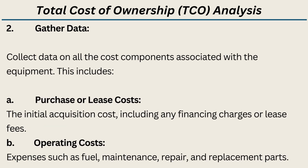Step 2: Gather data. Collect data on all the cost components associated with the equipment. This includes: A. Purchase or lease costs — the initial acquisition cost, including any financing charges or lease fees. B. Operating costs — expenses such as fuel, maintenance, repair, and replacement parts.